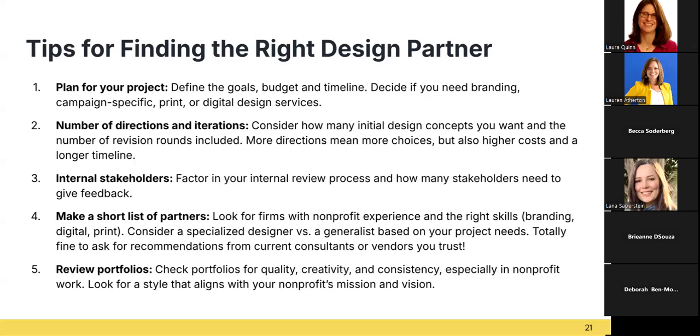But sometimes it's like, I think we do need some other elements, and your team is going to know that better than anyone. And again, it's important to be upfront with your designer or vendor, whoever you're working with, of what you're looking for, what would be most helpful for your team to take and continue using. I think it's also helpful to know the number of directions and iterations. So if you say you have your brand already designed, you might not need three design options or concepts. You might only need one, and that's going to save you time and money too.